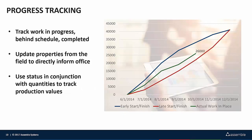Progress tracking gives a real-time update to the office and the entire team on the status of any given component at any time. The typical process in the past — tracking by bid package or by trade — would look at things that are not started, work in progress with statuses like behind schedule, or complete. Rolling all of that information up and associating it to quantities gives you the ability to quickly understand at any given point where you are against your schedule. This report was generated in Excel, but we now have connections to Excel directly as well as Power BI, giving you the ability to take information directly from the field and put it into a report. That update from the field into an OAC meeting could be completely live and up to date.